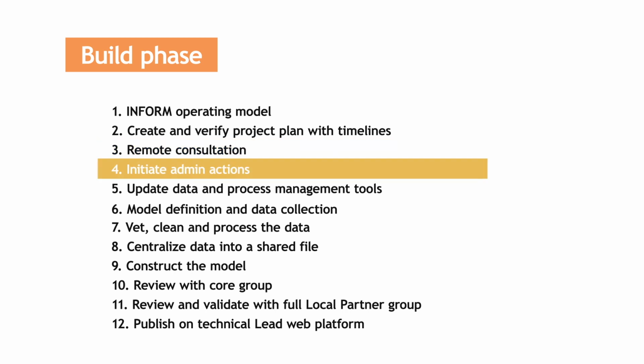Number 4, admin. Ensure that the subnational lead and the project manager work together to initiate administrative planning processes for travel, such as visa and accommodation, meetings, preparatory consultations with key INFORM stakeholders and working groups, and finally for the INFORM workshop, which is a formal consultation in plenary with all stakeholders to define the model and identify data. Administration takes time and energy.